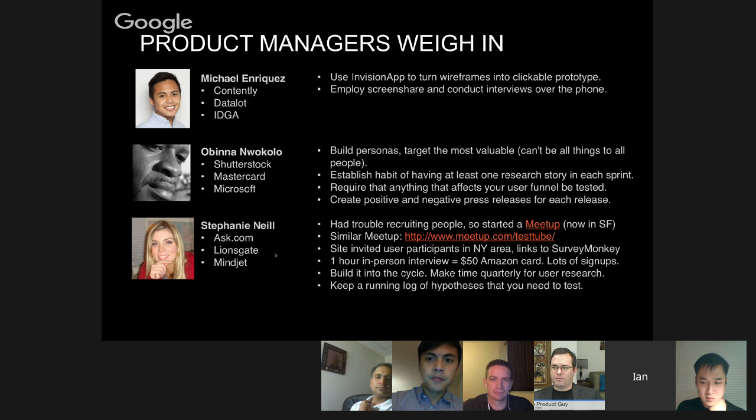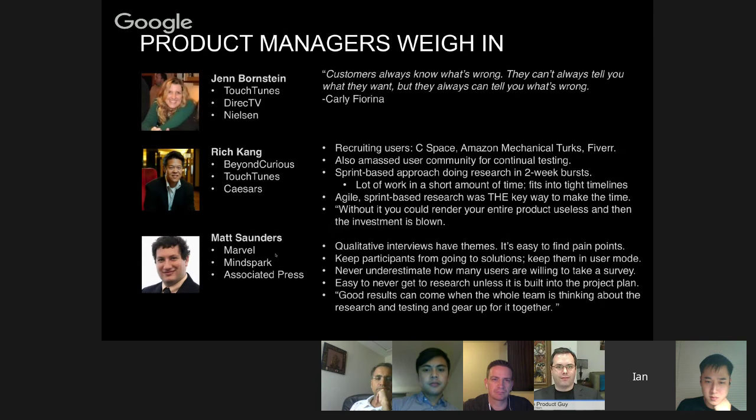People are surprised by the number of signups that they get, but people are interested in doing this stuff. Her recommendation is basically to build it into the cycle, and to budget for doing research on a quarterly basis, and I literally mean budget. In the case of annual budget exercises, or what do you have in your organization, really count on the fact that you're going to be doing some user research, and you're going to require some budget for that 4 times a year. And she also emphasizes the idea of keeping a running log of the hypotheses that you want to test.